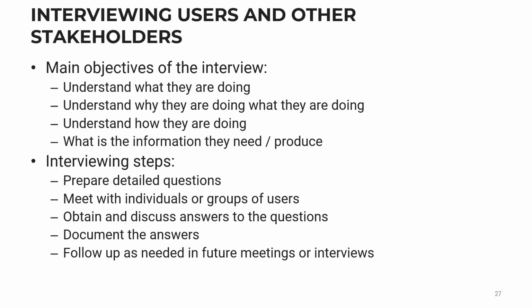All right, the interviewing steps. You need to prepare detailed questions. You need to meet with individuals or groups of users that you intend to question. Obtain and discuss the answers to the questions, document the answers, and follow up as needed in future meetings or interviews.